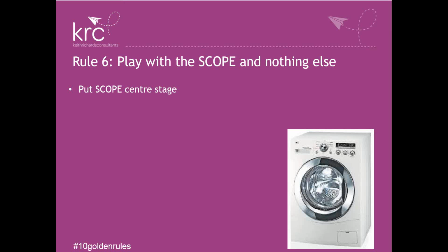Start to get into either flow or time boxing and concentrate on it's the features and the requirements that we deliver, and these are the things we actively manage. It's the safest place to go for contingency. That's why it's the thing to put center stage. If you're thinking of extending the deadline, in this day and age, that can be quite dangerous. Compromising quality, nobody should be doing that on a project. And throwing money at a problem can happen sometimes, but generally it's not a good use of time. It's not that productive throwing 2 extra testers at a problem to speed it up.